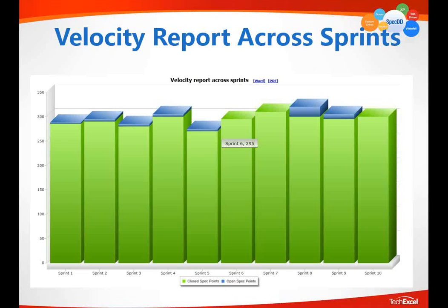Sometimes it's represented with no physical meaning, sometimes with physical meaning, by the team. With no meaning, we just use Fibonacci numbers to represent the size of every single task. So as a result, you cannot really use the points report to compare the productivity between team 1 and team 2 because the standard is different.